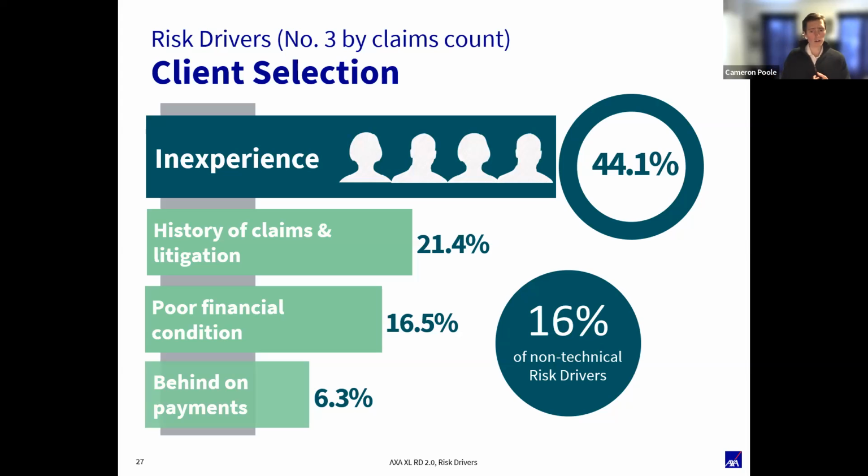Now you're paying one attorney to sue the client for fees, and you're paying another attorney through the insurance carrier to defend you from the design negligence claim. You almost never come out on top in those circumstances, right? You might collect the $50,000 in fees, but your insurance premiums are up for the next 5 years, and you've paid a $15,000 deductible. So you try to avoid that as much as you can by keeping up with those accounts receivable and having good payment terms that you stick to.